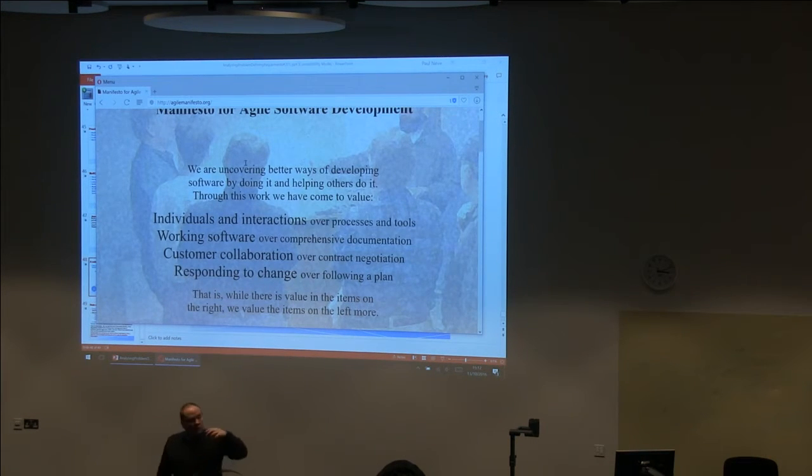So, if you do a bit, you come up with a prototype, right? And as a result of that prototype, your stakeholders go, oh no, that's not what we meant at all. You can take action at a relatively early stage. Contrast that with what's called a big design up front methodology, waterfall, something more conventional, where you essentially do requirements analysis and go away and develop software for 6 months, and then come back after a long period of time and go, here it is. We didn't want that bit of string dangling from the tree. We wanted a proper swing.